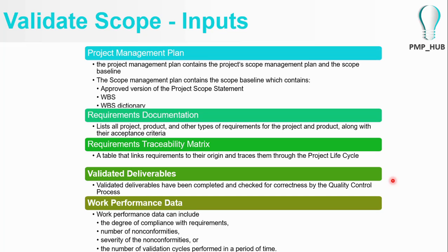Sometimes you are asking your customer to sign off subject to certain non-conformities. Maybe by the time you're going to your customer to show the deliverables, you usually will know that certain areas are excluded from this deliverable and are coming in another pack, another patch, or another software drop. So sometimes you might come up with the non-conformities or the degree of compliance with the requirements. You might have that information before you go to your customer's table.